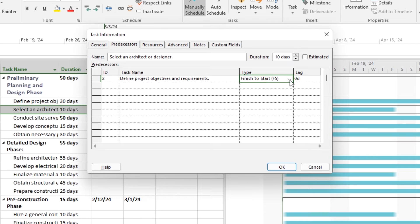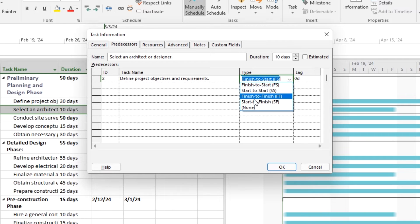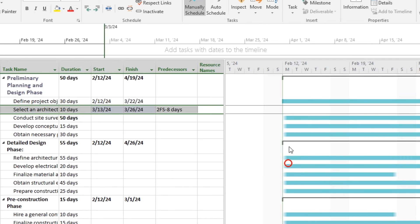Here you can specify the type of dependency: finish-to-start, start-to-finish, finish-to-finish, or start-to-finish, and set any lag or lead time if necessary.